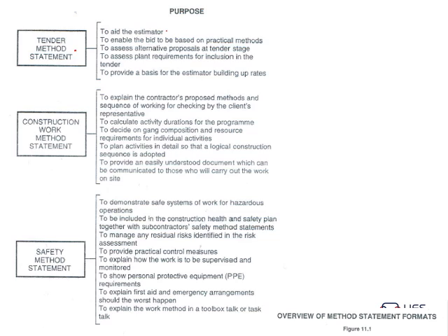It enables the bid to be based on practical methods and to assess alternative proposals at the tender stage, assess the plant requirements for inclusion in the tender, to provide a basis for the tender estimator. So this is very important. Why do you use method statements? Bernard, you asked, I think, why the method statements are used or when. So this is basically why we have it.